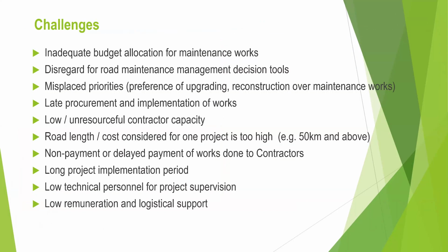Yeah, so challenges, we all know the budget allocation for maintenance works is inadequate. We have disregard for road maintenance management decision tools, misplaced priorities, late procurement and implementation of works. We have low or unresourceful contractor capacity, and the projects are too big, especially the road length, over 50 kilometers awarded for a project, and so it's not helping the network. Non-payments, and then we have long project implementation periods. A project can last for maybe more than 5 or 6 years, a maintenance project.